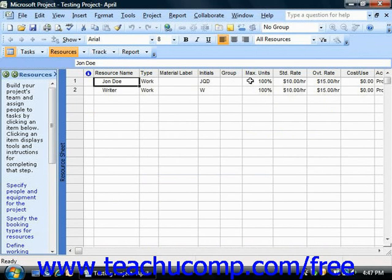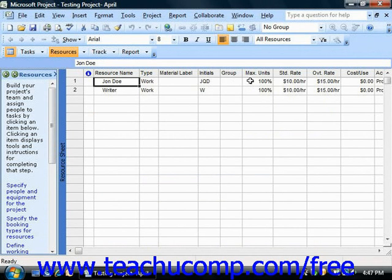Once you have entered a work resource, you can adjust its working schedule so that Microsoft Project can then adjust the scheduling and use of the work resource as needed. When you create a work resource in the Resource Sheet view, you can set the default working calendar for the resource from the Base Calendar Cells drop-down menu. In this lesson, we will examine making individual changes to the availability schedule of a work resource.